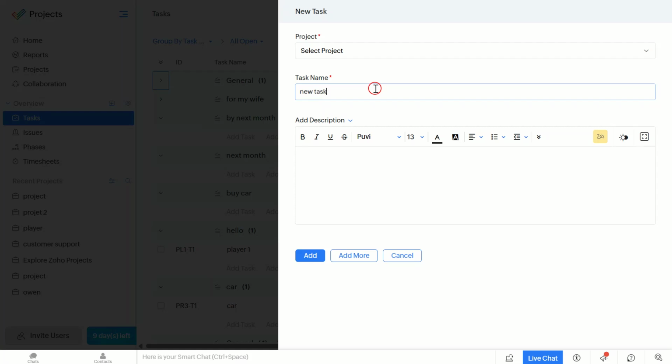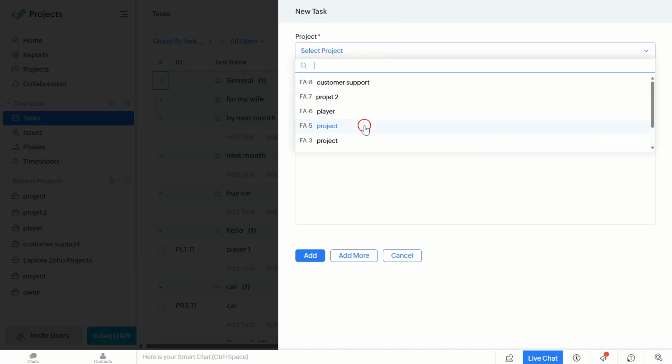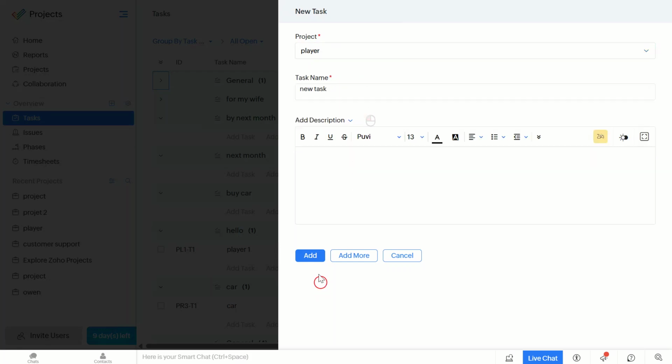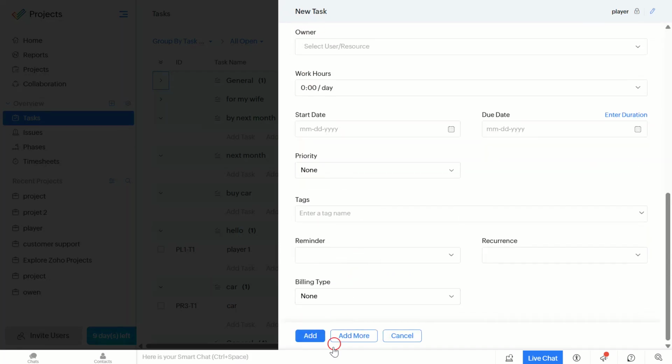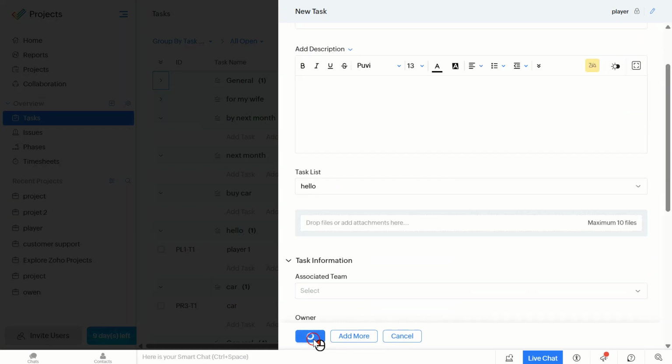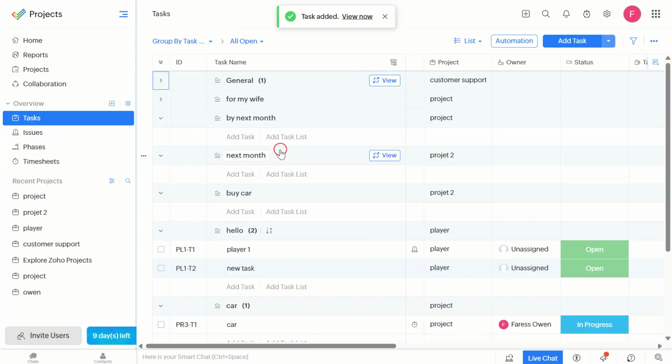After creating your task, it's time to prioritize. You'll notice a priority drop-down menu when you're setting up your task. This helps us because it provides a way to rank your tasks according to their importance. You can choose from 4 options: critical, high, medium, and low. Select the one that best fits the urgency and importance of the task.